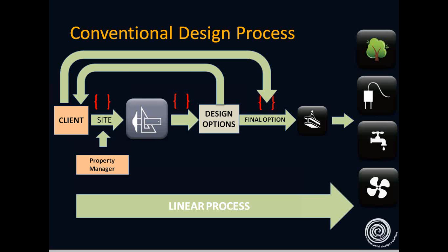The design was passed on to the HVAC consultant for sizing of its equipment. Then the facade consultant was hired. He suggested shading to control the glare. The additional cost of shading and HVAC costs increased due to bad orientation.